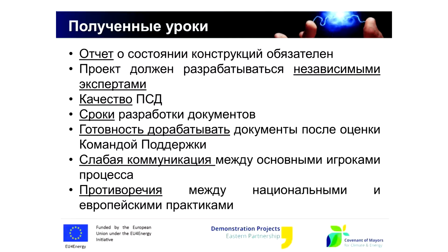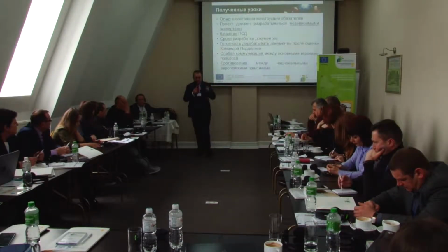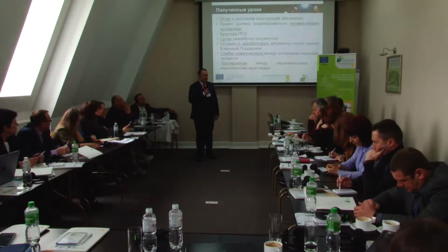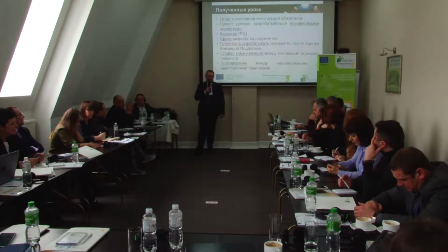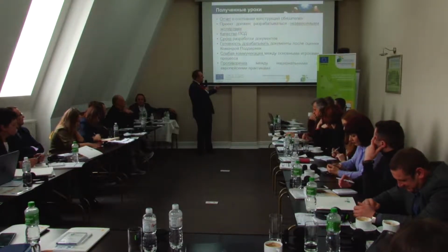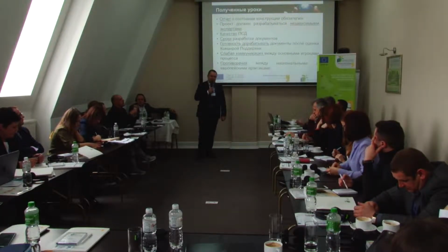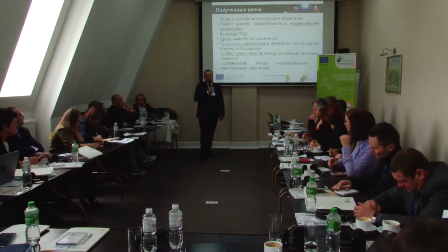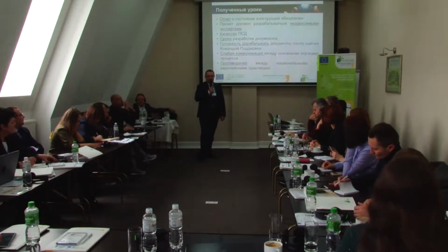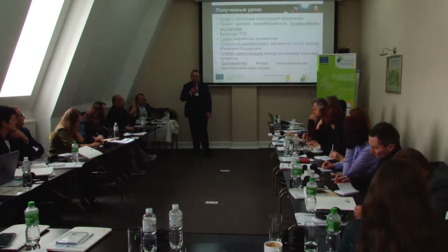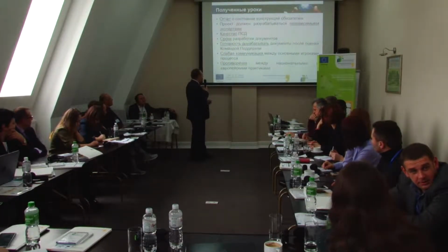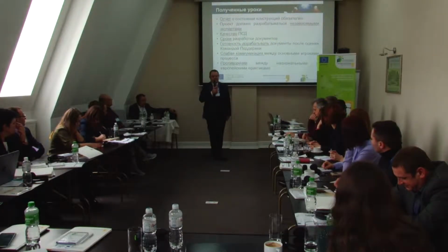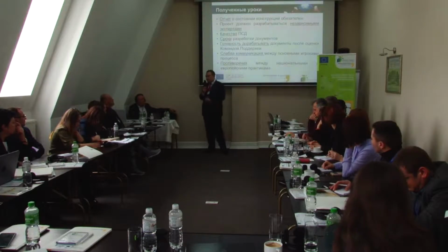Another point is being ready to amend, to modify the documents after they are verified by the support team. Do not make Ukrainian mistakes. Some have already paid 100% to the project developer or designer before the verification, and later faced some problems in terms of changing certain issues after this verification. So mind, if you pay 100%, you won't be able to make the developer introduce amendments to the documents.